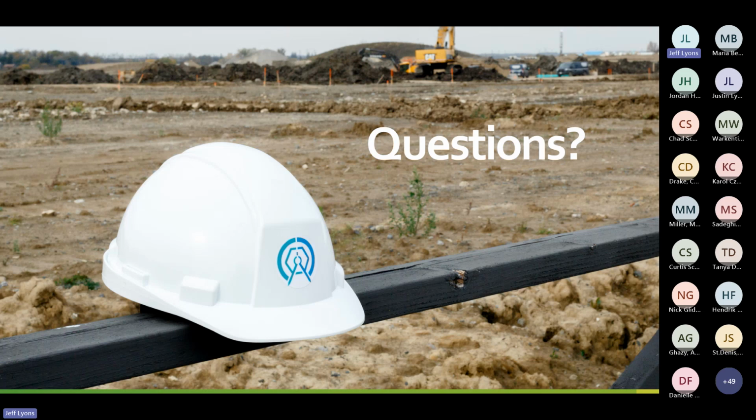Yeah, and for estimating, keep in mind that we use item codes and design properties, but we can also use project properties. So custom project properties are possible. So you could say, well, this job is in a certain part of the county or the region. Only compare other projects within 25 miles of this one or 25 kilometers.